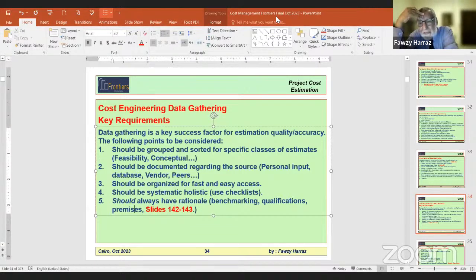No. There is another way, putting ethics aside. Ethically, you should advise the consultant and the owner that there is one big item missing from your BOQ. Another option is to close your eyes and overlook this item, and you give your price of the BOQ, which is acceptable, and you win the job. And after that, 2 or 3 months later, make a variation proposal.